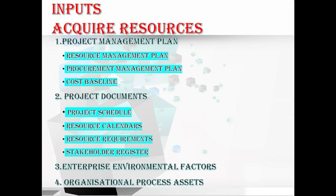The next input is enterprise environmental factors and organizational process assets. EEFs include existing information on organizational structure, market conditions, and geographical locations — such as acquiring resources from different locations. OPAs include different policies and procedures for acquiring, allocating, and assigning resources to the project, as well as historical information and the lessons learned repository.